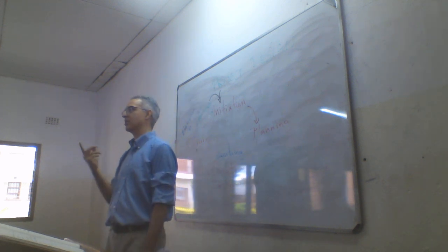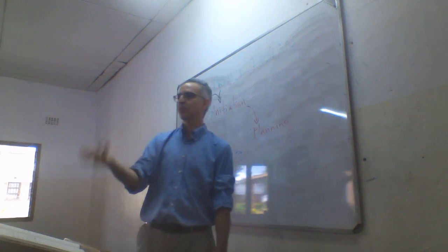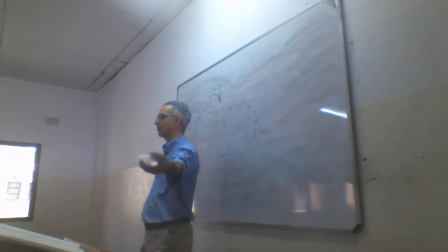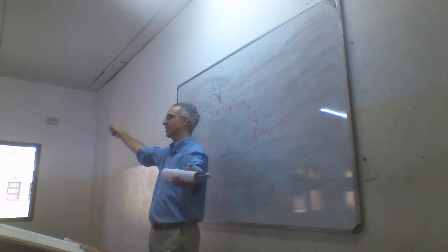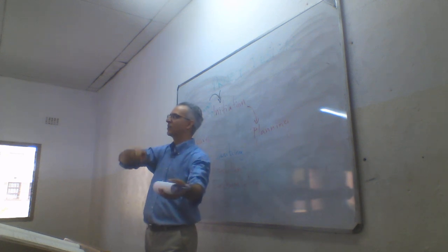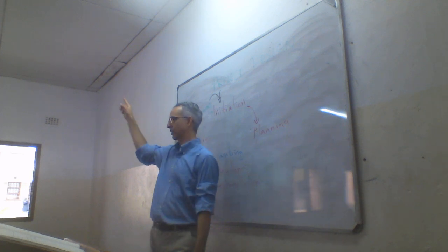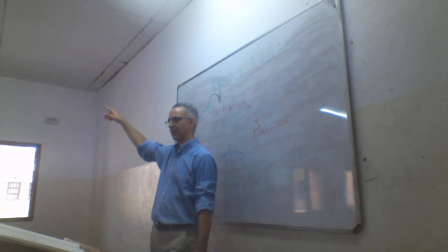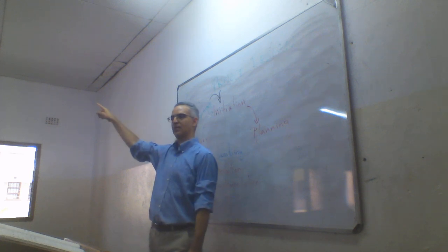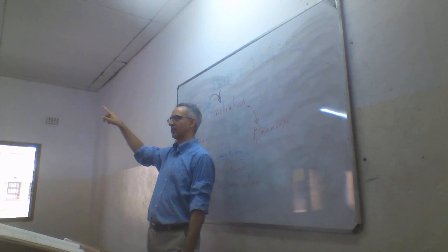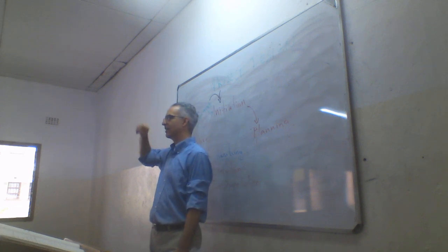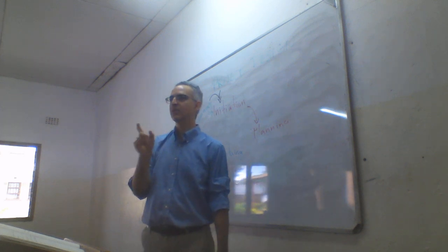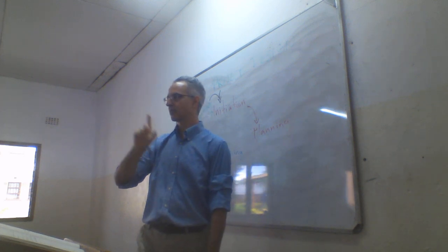So you cannot determine whether a project is successful unless you know where you started. Where did we begin? Where did we end up? Where did we think we were going to end up? What was the plan? Then you can compare: where did we want to get? What difference did we want to make? What difference did we actually make? Then I can evaluate, and you can compare those two numbers. But if someone doesn't give you those, right?